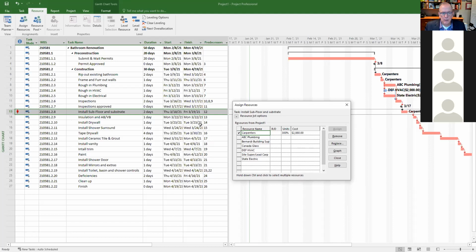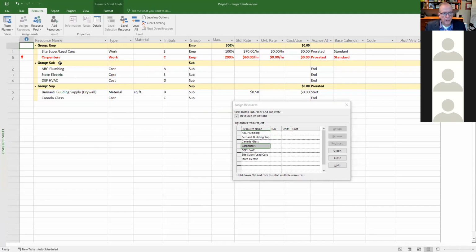Because if you recall, on the resource sheet, if I slide to the left, I said there was only 2 available, but I assigned 3. So that's going to flag it for me to say, hey, you said there was 2 available, yet you assigned 3. Are you okay with this? If I'm okay with this, I should change it to, okay, yeah, it's going to be okay.